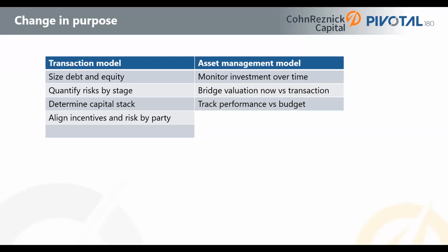We may also review shorter term performance of the project over the last year versus our last year's detailed budget. I'll explain budget shortly, but we're looking at short term performance. We may also track cash flow of the project in total versus, again, what we thought the total project cash flows would be when we hit financial close. And that model that we had at financial close is quite often called the base case.